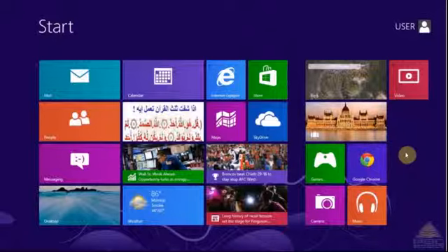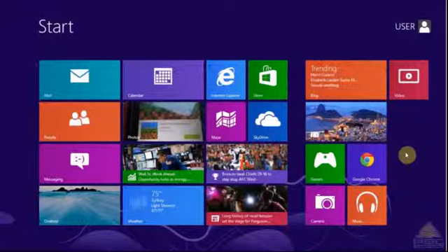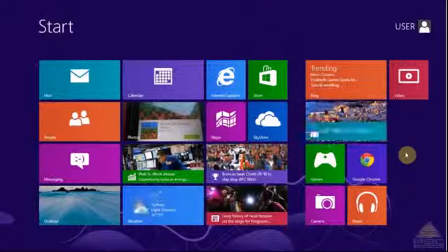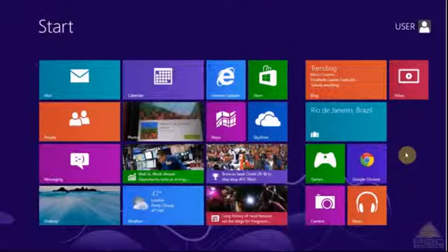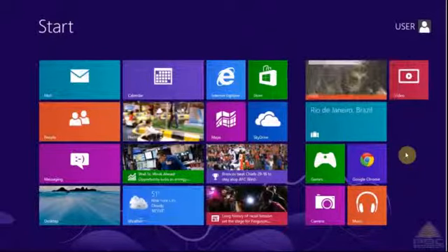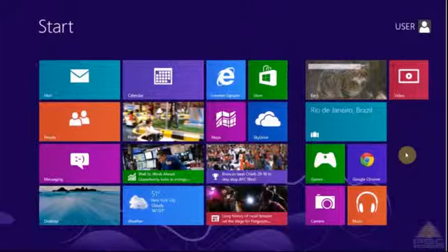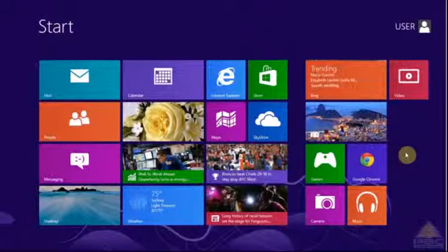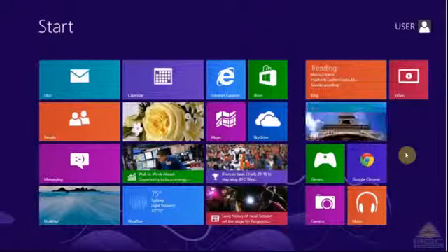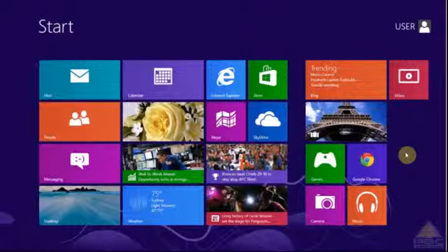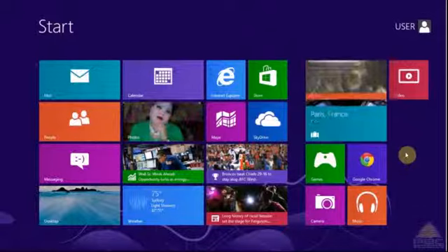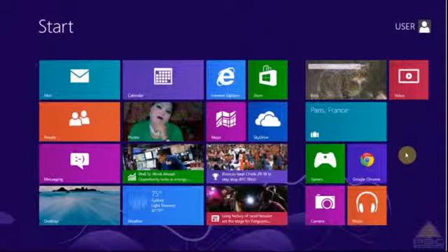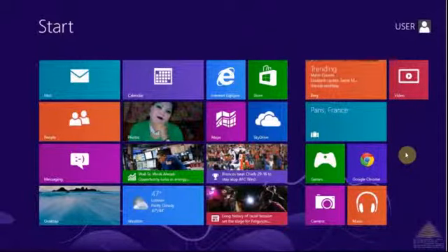1, 2, 3, 4, 5, 6. This is Friday as well. So you cancel out all the Fridays. You receive notification that the 9th of December will be off. We know that on the 11th of December, we will be working only half shift. On the 4th of December, we're working double shift. So you get all the information loaded to your calendar, and then you map your activities here.